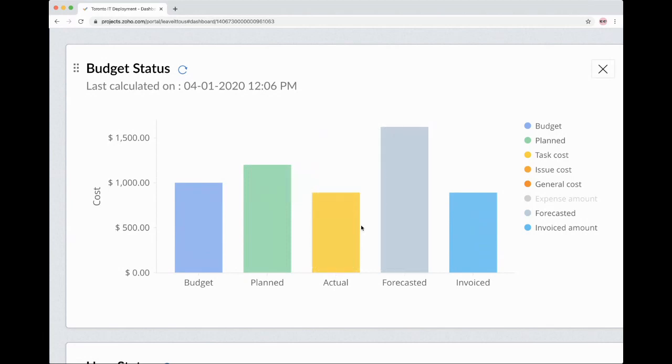So then you have, and this is what you have logged hours for. And again, I'll show you how to do that in just a minute. But as you can see, we have kind of this different plan versus actual. But then this is the forecasted. So this is how much money it thinks we're going to end up spending if we keep on this trajectory.